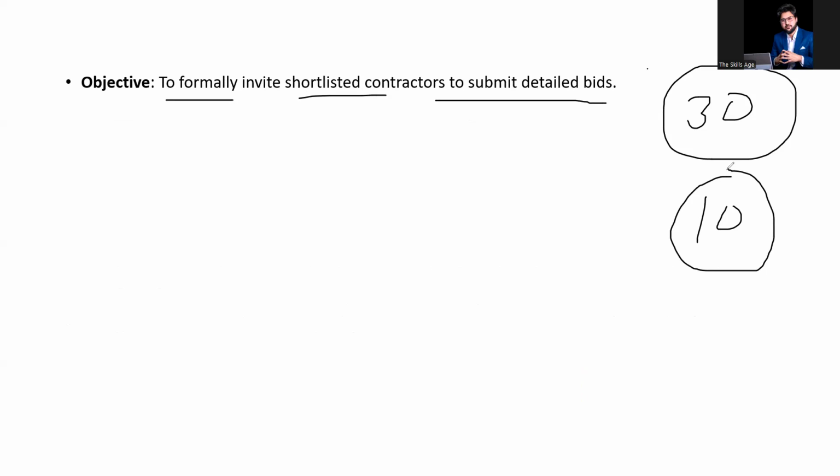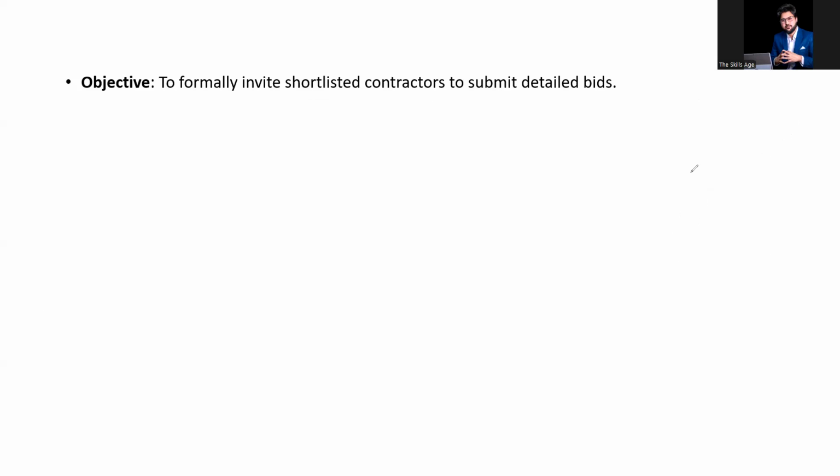They have already worked on the same projects meeting my requirements, as per API, as per safety requirements, as per financial statement requirements, as per their qualification. So only 10 companies were shortlisted, and they will move forward to the second stage, the second pool. So this is ITT. The objective is to invite them for bid submission.